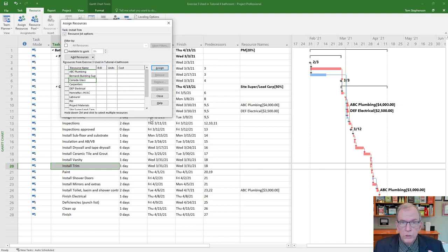But it is nice. You really get a good handle of where your costs are coming from, and then when you update, you see any variation in time frame. It does those calculations. And if you had, say, your own forces, like your carpenters working every day, and you planned it to take 12 days and it took 15 days, it would show you the variance of those 3 days. So then you could start asking, why did it take 3 days longer? Did we estimate it wrong, etc.? So it's very, very helpful when you do that, but it is more detailed and work-oriented. If you're just starting out, just assign resources and get used to it and how that part of it works, step by step, or bird by bird, as I like to say.